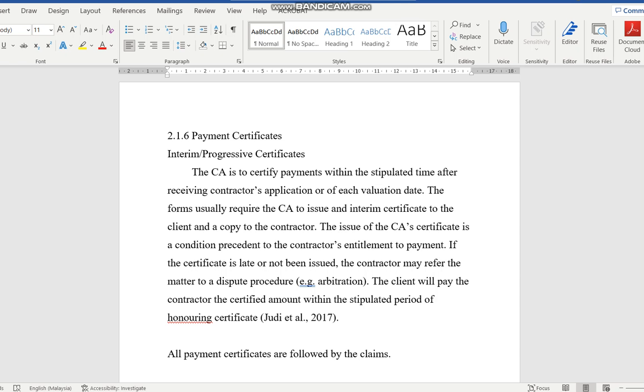They are the ones that will bring in machineries, materials, and all sorts of requirements that need to be there in order to carry out the work. They have to use their own money for the first 3 months or so before the first payment even comes.